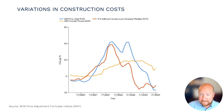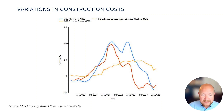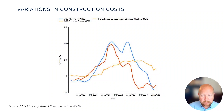Looking at the same building series for the period just prior to COVID up to July this year, and picking up on a few indexes, we can see again there is huge variability in movement. We can see the annual inflation movement in working with steel piling in blue, precast concrete in yellow, and softwood carcassing to structural members in red. The specifics of your project and the weightings of labour, plant, and material resources can vary significantly depending on what you're actually working on and the proportion of overall cost those resources account for.